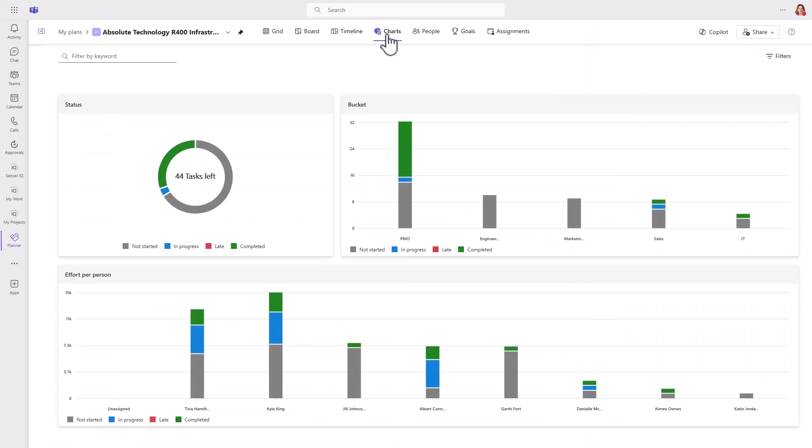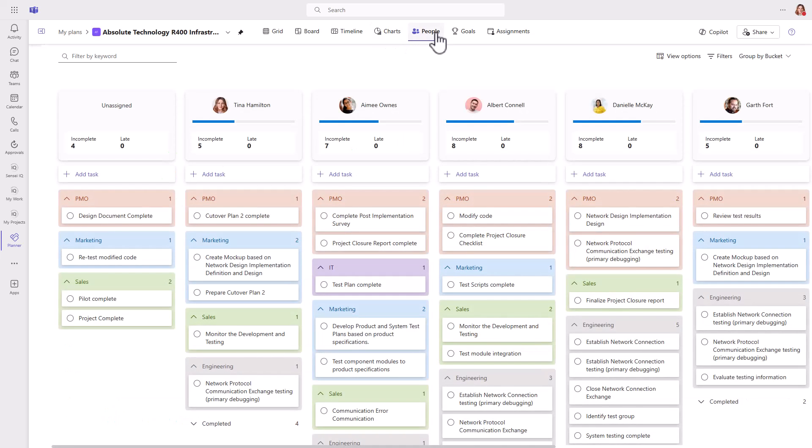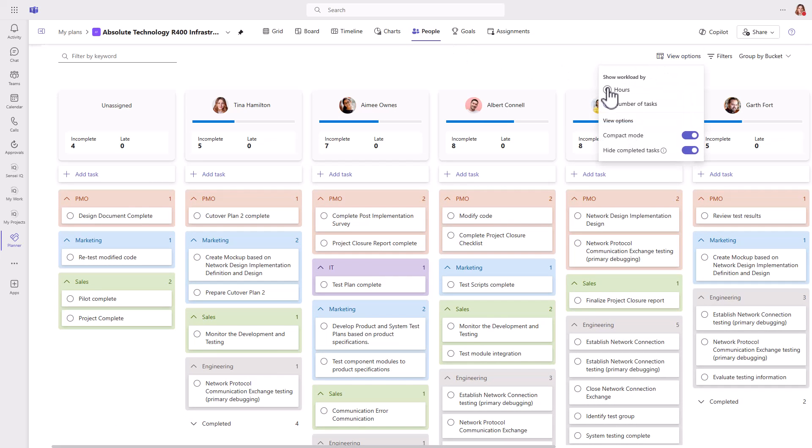The charts view summarizes tasks by status, bucket, and effort per person. The people view helps us better understand and balance workload, either by number of tasks or hours assigned.